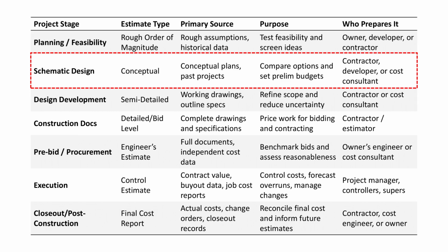At this stage, we prepare a conceptual estimate. The inputs are schematic drawings, program information, and past projects, not detailed construction documents. The purpose here is not pricing for bidding. The purpose is to compare options, test design decisions, and set a preliminary budget.